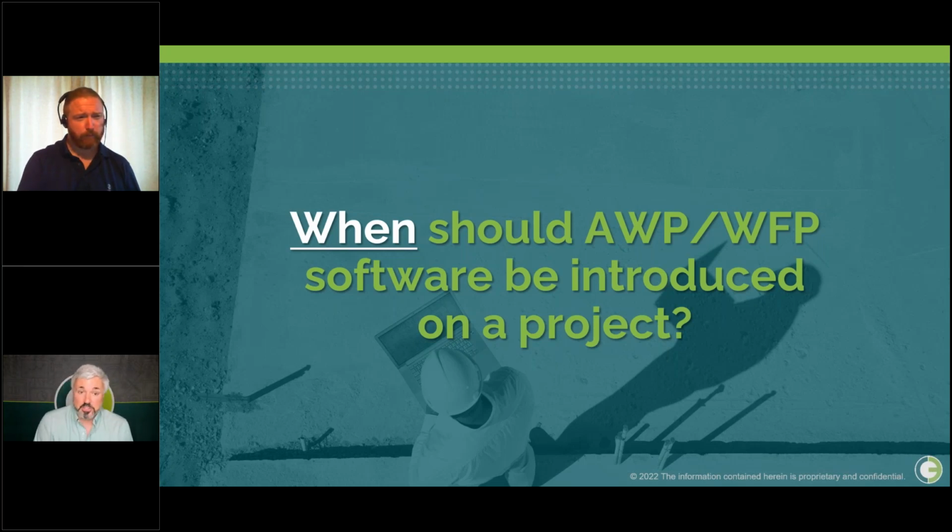And to answer that, the first thing you have to do is distinguish between those two concepts, right? AWP is a project execution methodology that goes across the entire project lifecycle, right? It operates from really the beginning of the project, but even if you're not engaging in the beginning, at least incorporating through the earliest of engineering stages all the way through commissioning and completion. And workplace planning, on the other hand, is really focused on the construction execution phase.